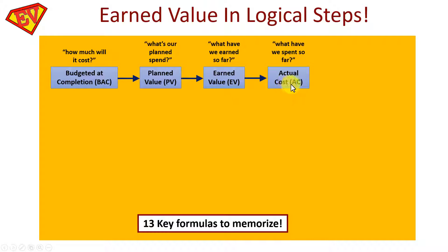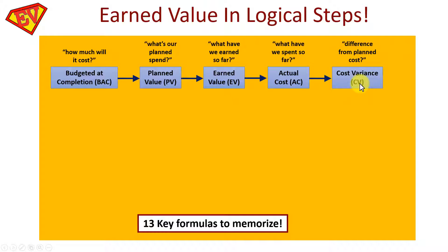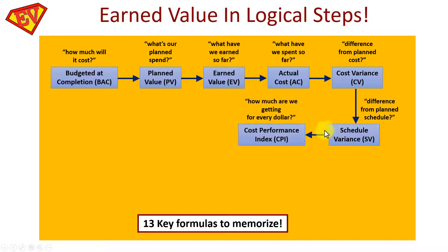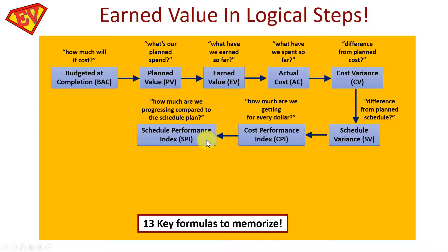Next is Actual Cost (AC): how much have we actually spent. This slide gives you an overview of the steps. Next is the Cost Variance (CV), which is the difference from the planned cost — one of two variances. The second is the Schedule Variance (SV): the difference from the planned schedule. Then there are two performance indices: the Cost Performance Index (CPI), which calculates how much you are getting for every dollar, and the Schedule Performance Index (SPI), showing how much you are progressing compared to the schedule plan.